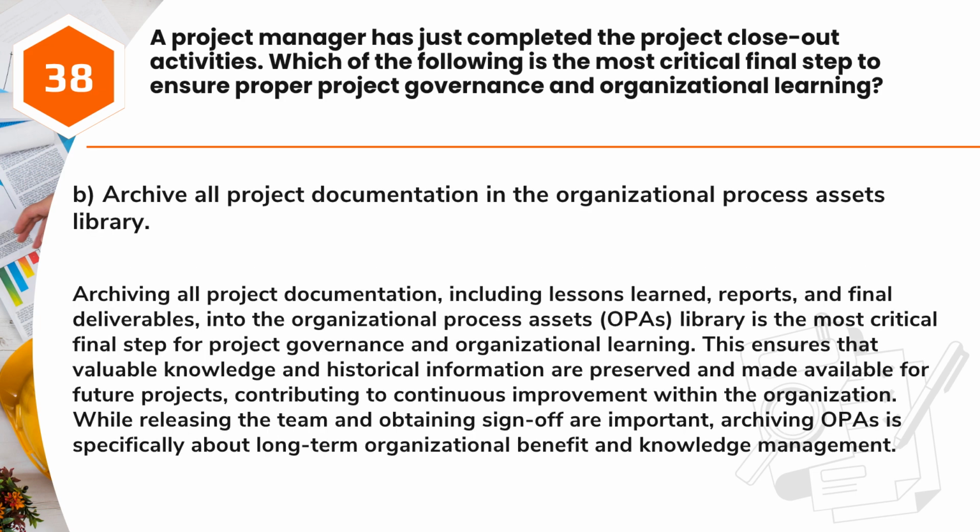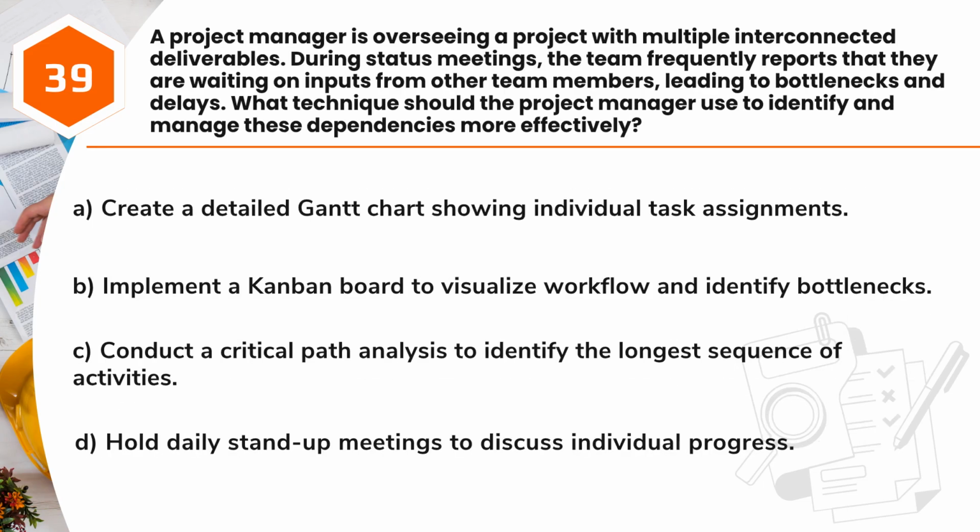Answer: B. Archive all project documentation in the organizational process assets library. Archiving all project documentation, including lessons learned, reports, and final deliverables, into the organizational process assets, OPAs, library is the most critical final step for project governance and organizational learning. This ensures that valuable knowledge and historical information are preserved and made available for future projects, contributing to continuous improvement within the organization. While releasing the team and obtaining sign-off are important, archiving OPAs is specifically about long-term organizational benefit and knowledge management.